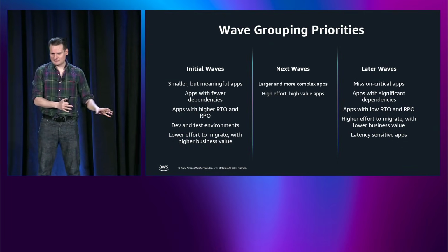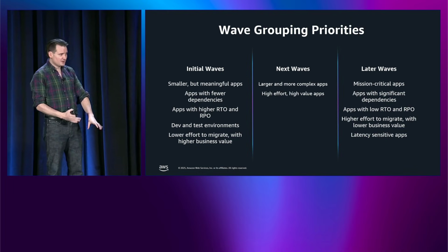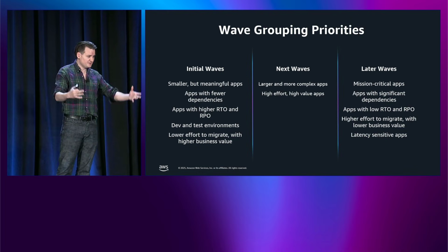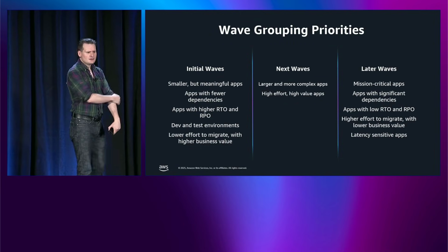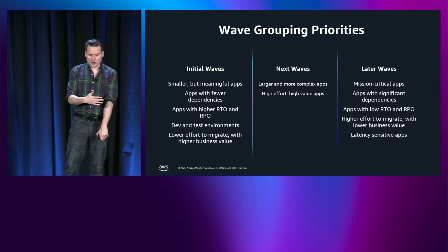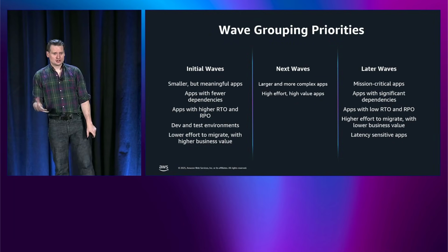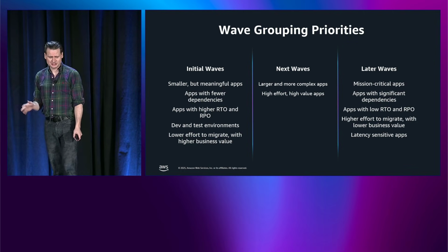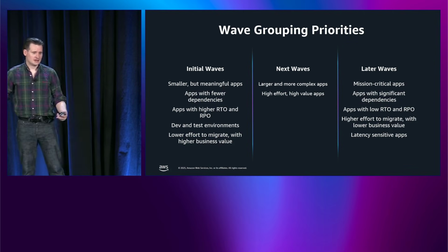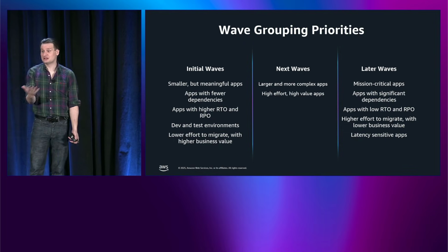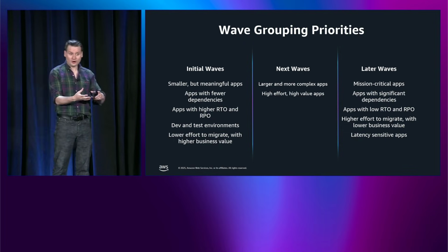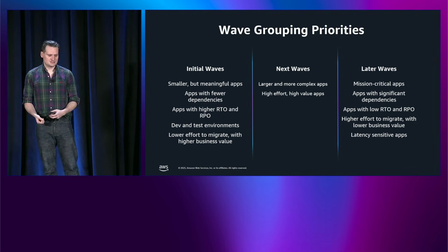I want to start off my plan and execute some of it and show value to my leadership, to show that my migration plan is actually feasible and indeed works. And typically, you start off with some small but yet meaningful applications. So you don't typically want to start off with purely dev test or throwaway applications, because that doesn't necessarily prove anything. Anybody can move a server that doesn't have any users or an application that has no data. You want something that is small but actually has meaningful business value to it.